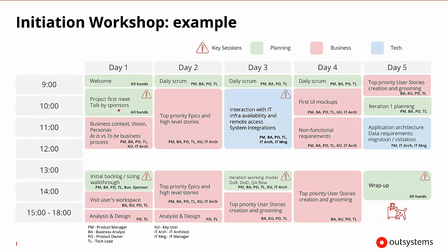We'd want to make sure we could get the assumptions and the risks identified, as well as an overall communication plan. So it's highly recommended to take the opportunity to ask the business sponsor to actively participate in this first meeting so that they can give a motivational talk on the importance of the project.